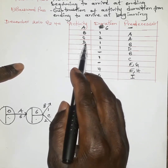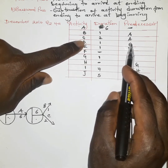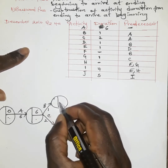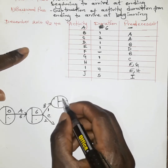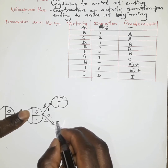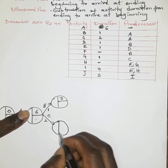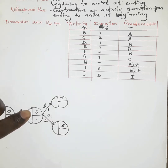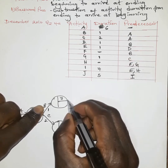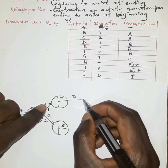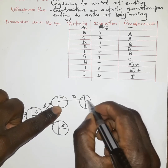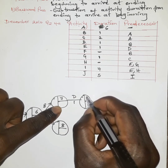For activity D, it begins as soon as B completes. Activity B takes one week, so the next activity will begin after six plus one, which is seven. Activity C's next node will begin after six plus two, which is eight. Activity D depends on B's completion and takes a duration of one week, so it will end at eight weeks — seven plus one.